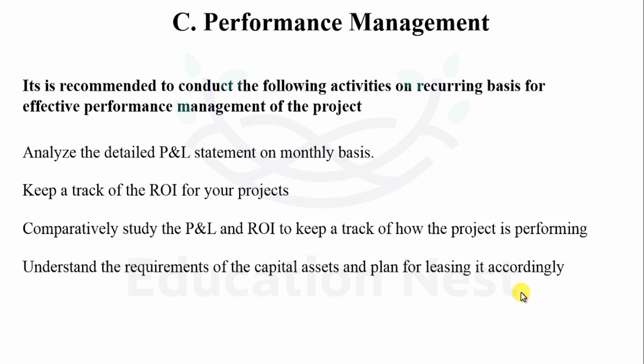As you had seen, if you recall previously, when we computed the 1 year calculations, at that point of time we thought it's better to lease the asset. When we extended the computation to 3 years, our decision went in favor of buying the asset. So those are the tricky parts which you need to take care of as a project manager to enhance the efficiency of your project and to make smart, effective decisions.